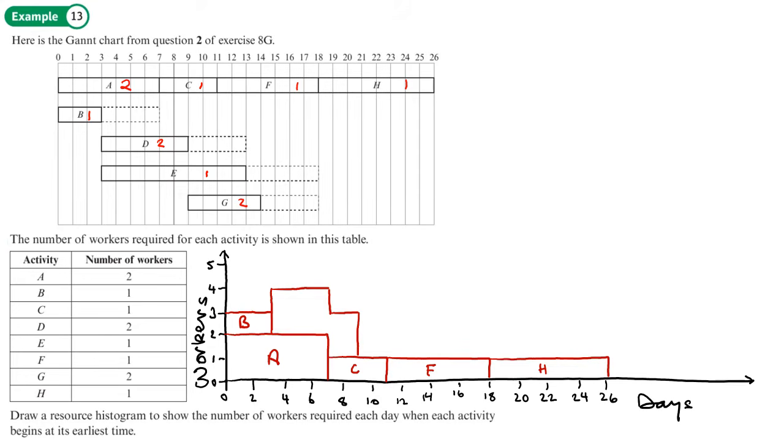Okay, so this would be D. See how when we get to this point here, 7, we just drop it down so it fills that gap. It's a bit like Tetris, I suppose. You want to make sure all the gaps are filled. So if it helps, you could draw a dotted line to see how this last bit here has just dropped down to fill that gap.